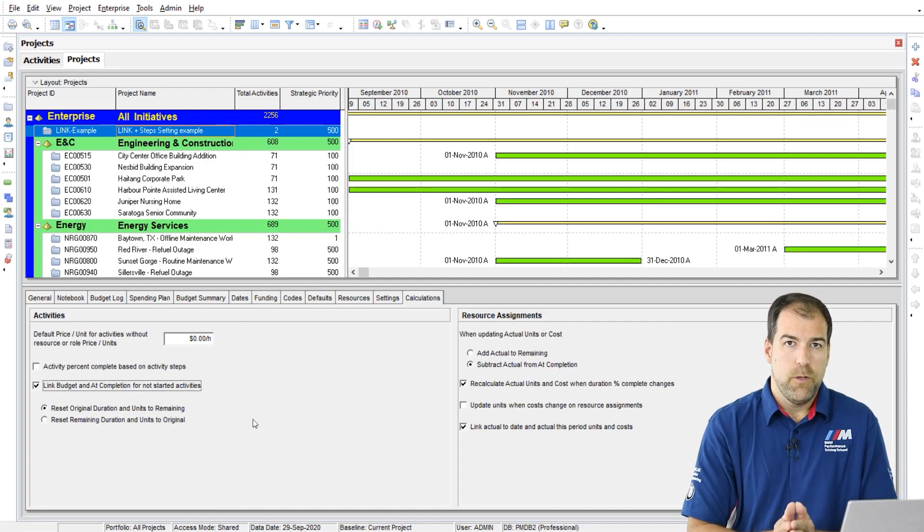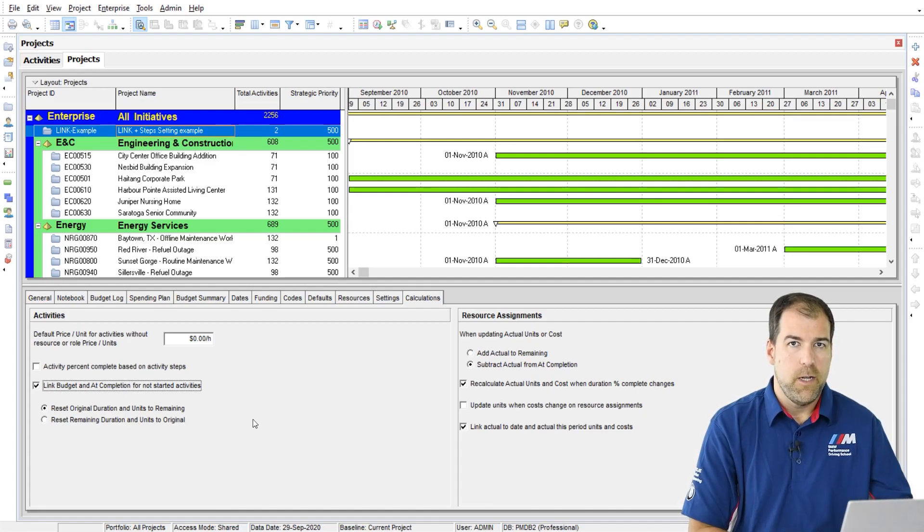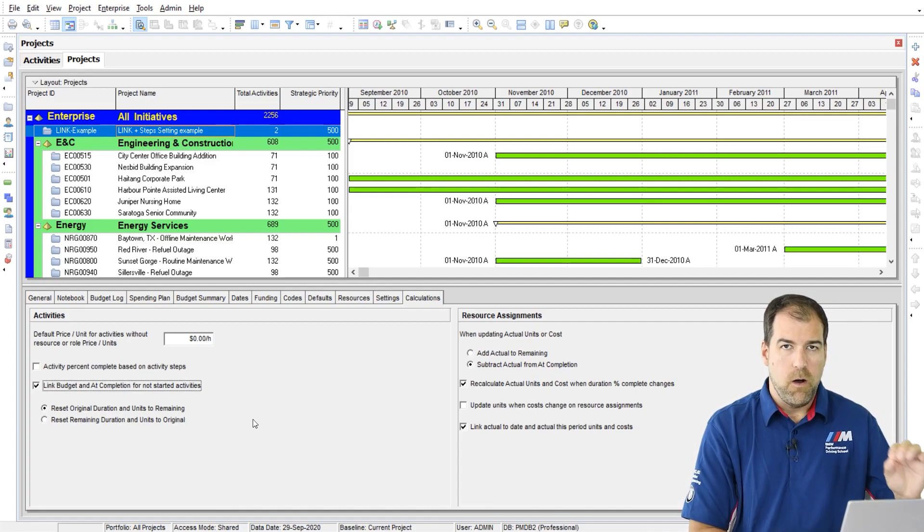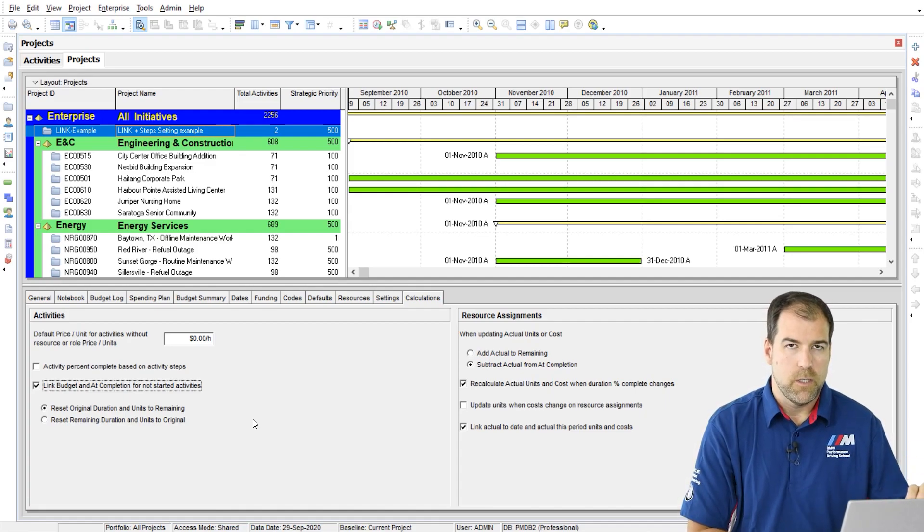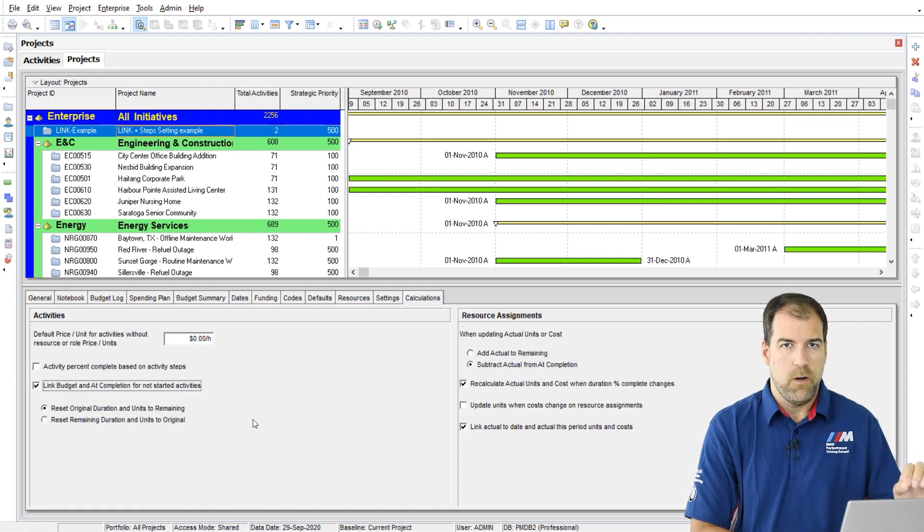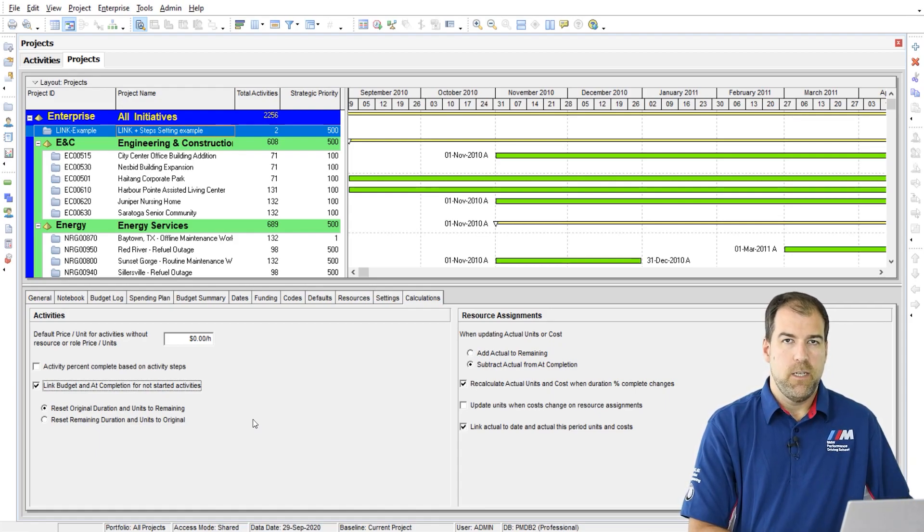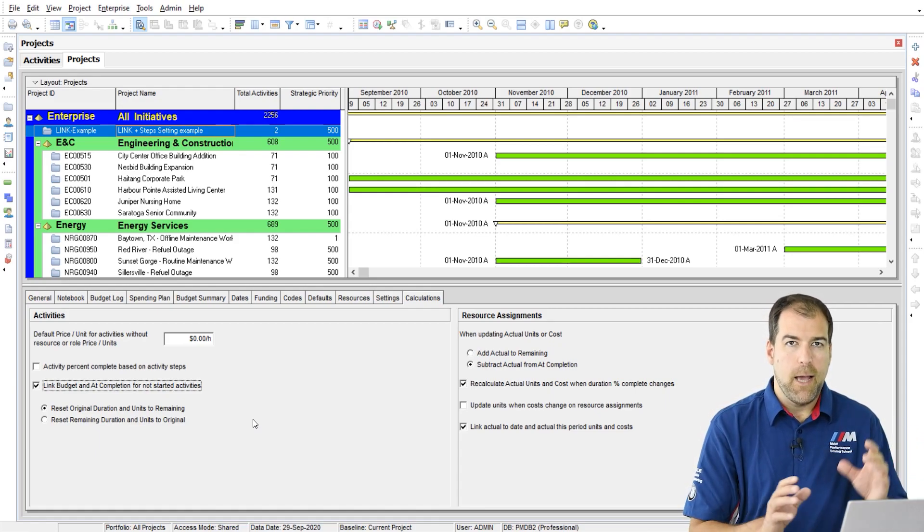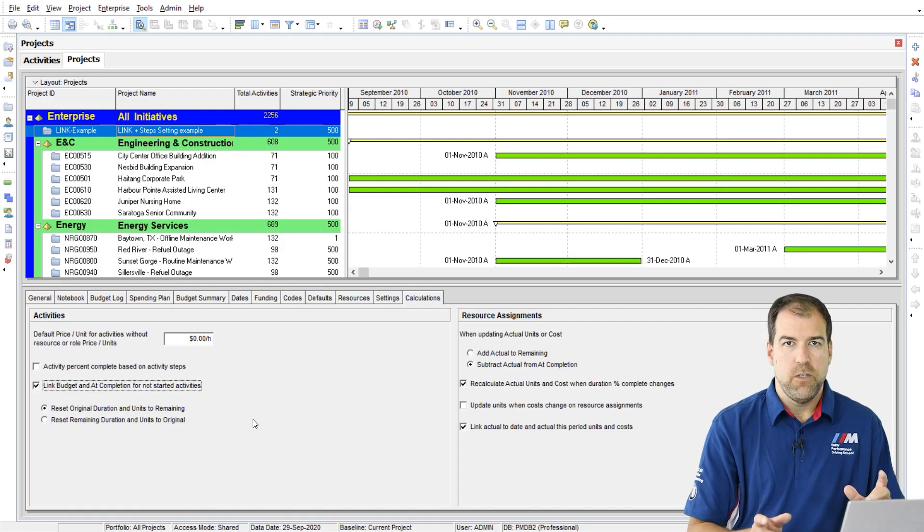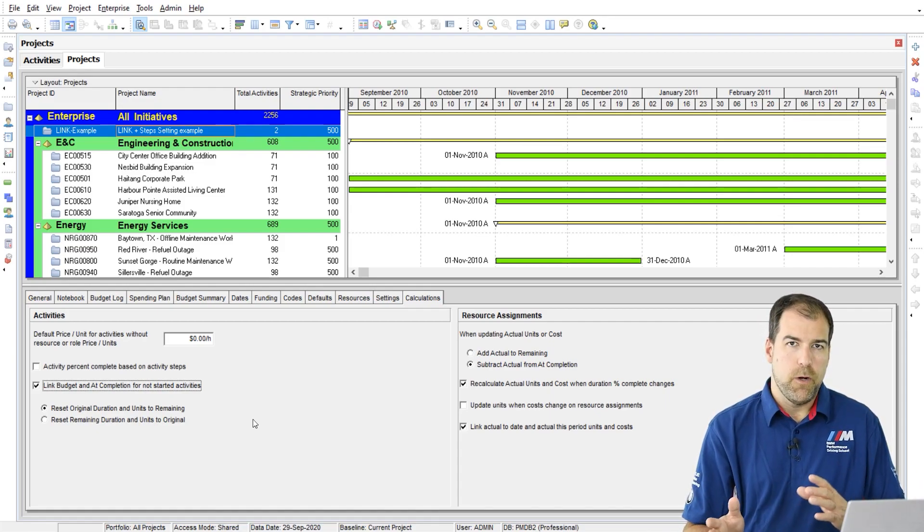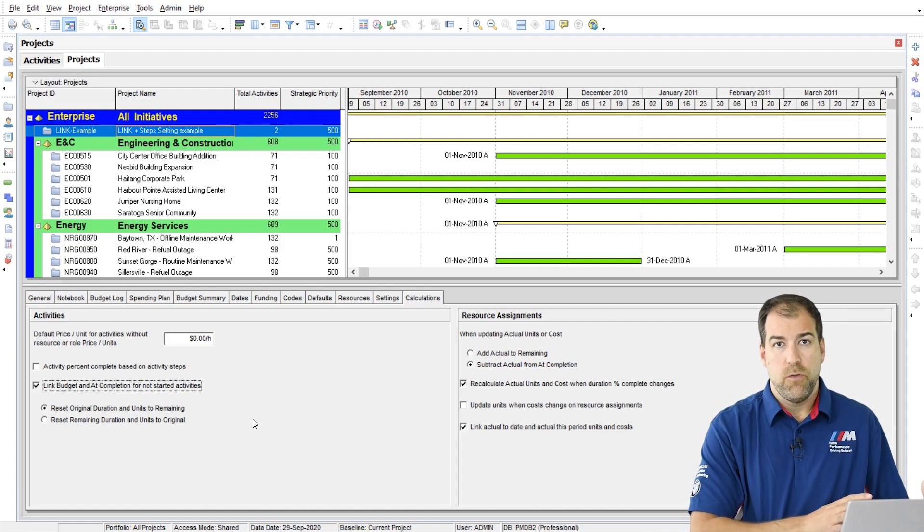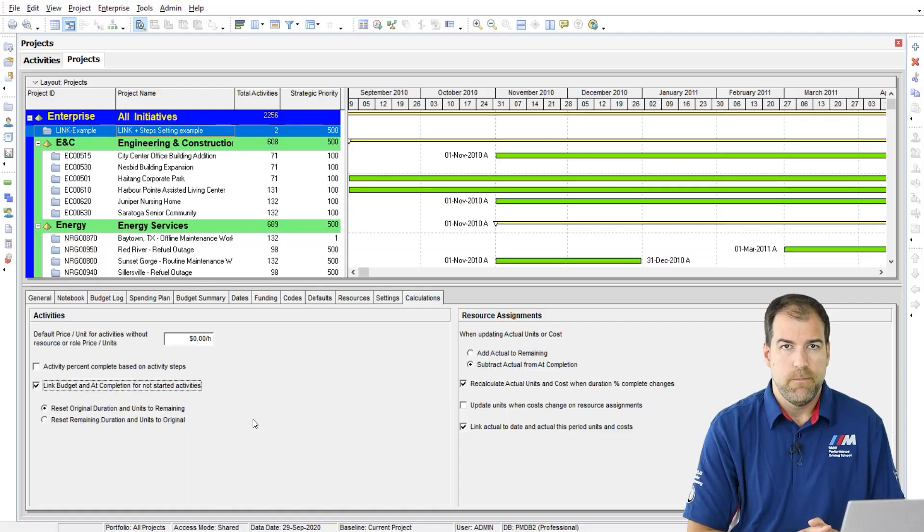So I really recommend you leave this on and even audit your current projects to make sure that it is turned on. Use baselines to capture any changes and to compare your current project that may have changed to the original estimate.